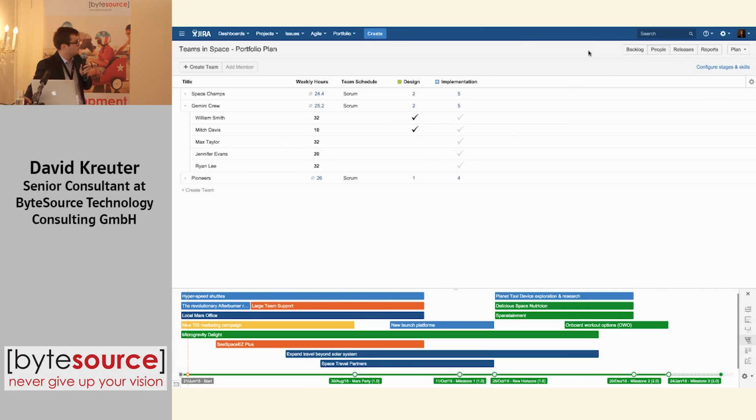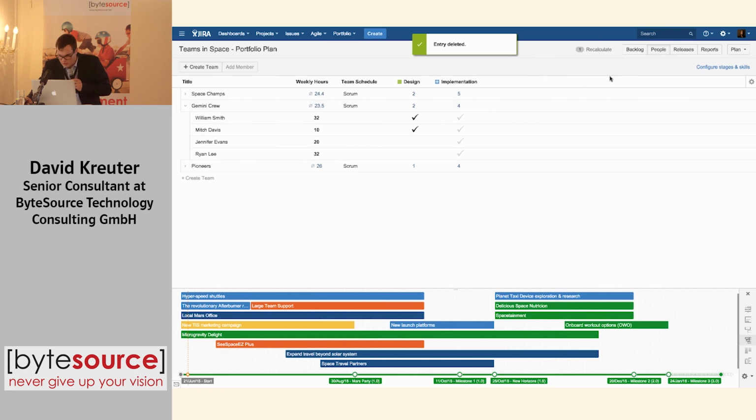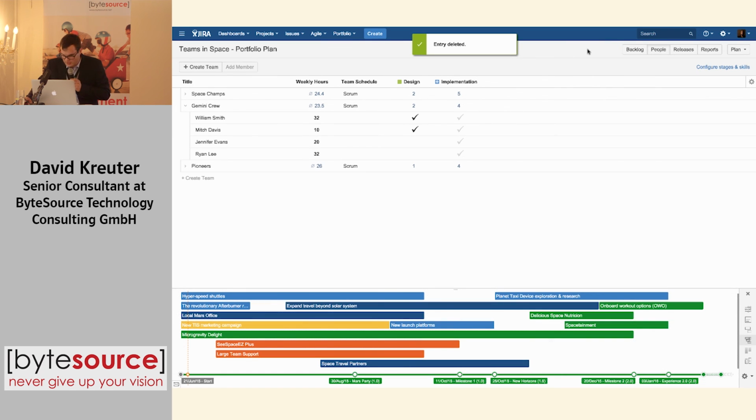So I have to recalculate my plan. As you see, nothing changed. Not so much. I still match my release dates, but I'm not sure about Gemini crew. Let's kick out some other guy, and let's recalculate. So, as I said, I'm not so well prepared for this demo, but anyway, come on, I kick out another guy. We should see that we do not match a release date.